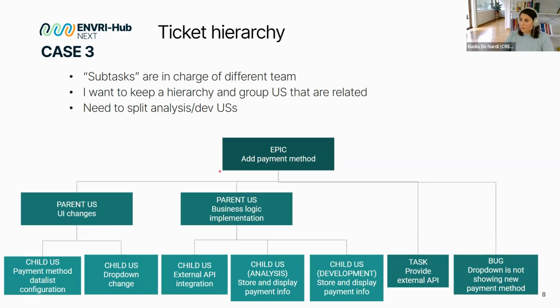Then in case, for example, one user story is really heavy, for example, the implementation of the business logic related to the storage of the payment info, in this case, we can split again into a child user story for analysis. So in order to analyze and define better with the user the requirement, and then the development, okay? So I know that I will spend much time on this user story, and then once it's closed, I can complete the other. Okay.